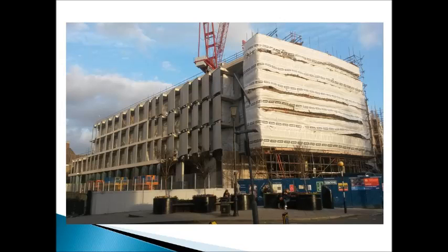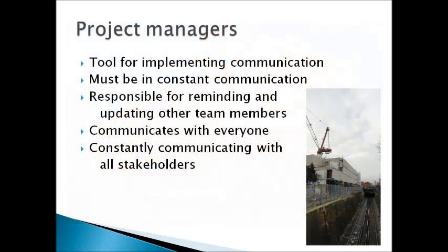The architect will then have timed one-on-one meetings with the contractor to check that all the snagging has been signed off at least 2 weeks before the handover meeting. The project manager is pivotal in communicating with everyone, utilizing all of the listed methods, reminding and updating people about development and ensuring that everyone is performing optimally for the project to keep within the time frame.